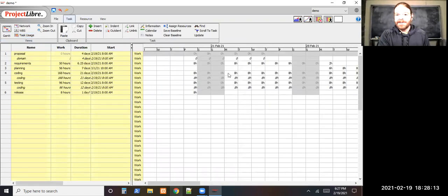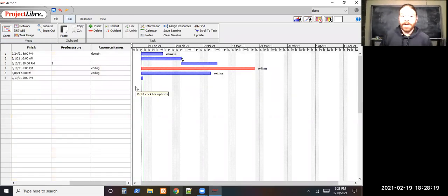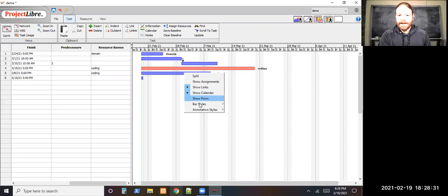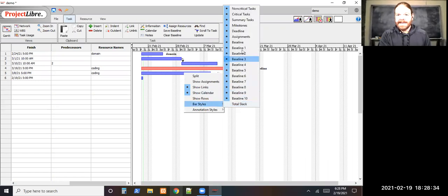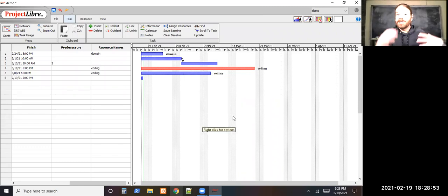And as time progresses, you'll see these things get updated with all the updates on how it's going, and things will adjust and update. So there are baselines showing things like that. It's at different baselines. So you have your original plan, and if something changes along the way, make a second baseline so that all the scheduling, budgeting, and all of that updates all the way through. And you can still compare it to the different baselines, set different milestones, like, on a certain date, you should be at a certain point.